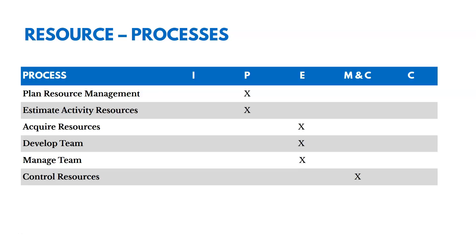There are six processes in this chapter. Two are in planning: plan resource management and estimate activity resources. Three are in executing: acquire resources, develop team, and manage team. And then control resources is in monitoring and controlling.